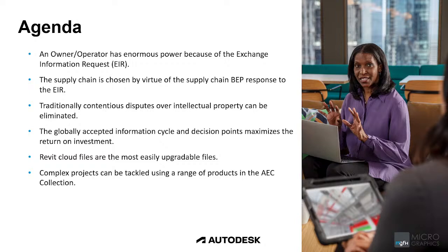In other words, files are shared safely. In essence, a copy of a copy is shared to the receiving party, and the original is worked on in a work in progress environment, and the intermediate copy is the shared file, which is there as a record of truth. So that is the contention of the supply chain.